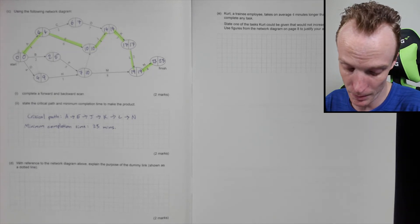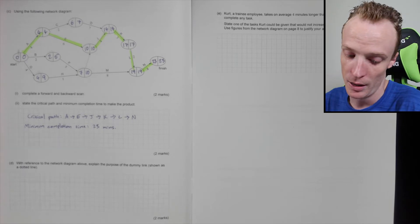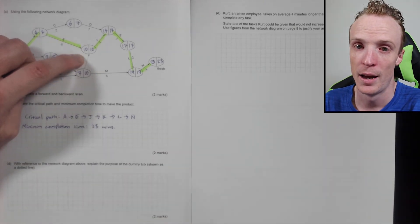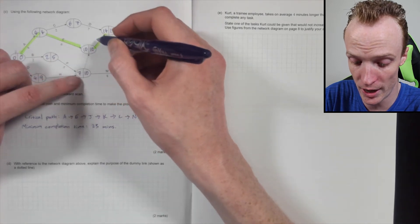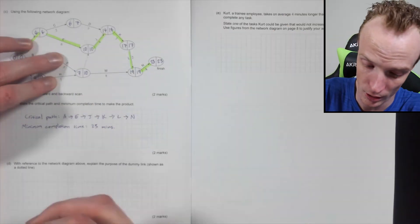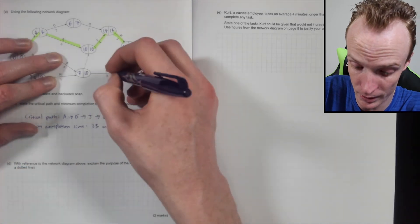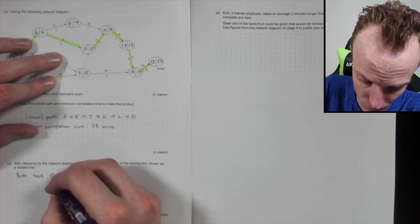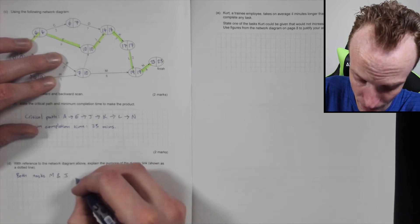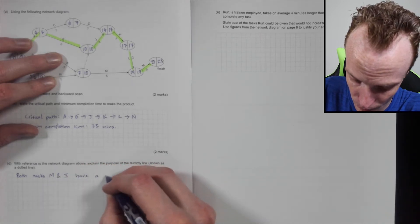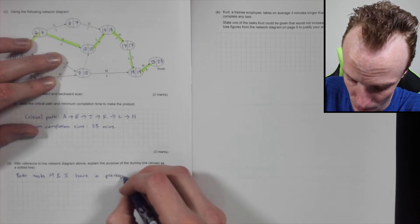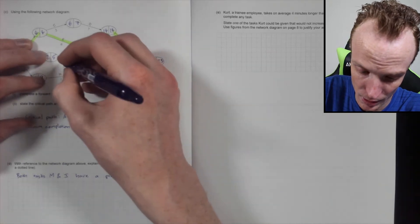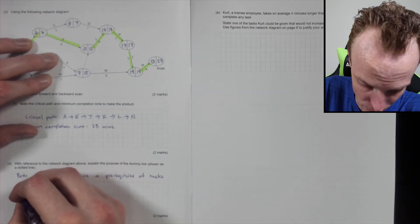With reference to the network diagram above, explain the purpose of the dummy link shown as the dotted line. Now you want to be fairly specific here. The purpose of the dummy link is obviously to reflect a connection that task J has a prerequisite of task F and H, as well as task M. So I'm going to say both task M, or tasks M and J, have a prerequisite of tasks F and H.